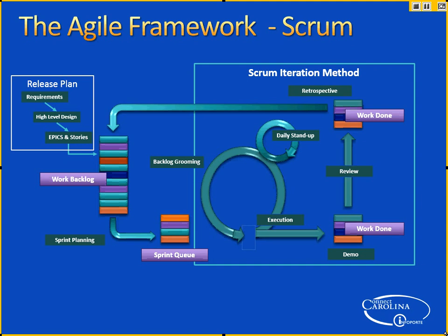After you've done the demo, the team does the review, which basically says, okay, what happened, what went well, what didn't go well, a little causal analysis, okay? And then there's sort of a separate session to take some of the learnings out of here. It's called the retrospective, where you go, okay, so given what happened, given what we learned in the review, what should we change, if anything? What are the changes for the next sprint?